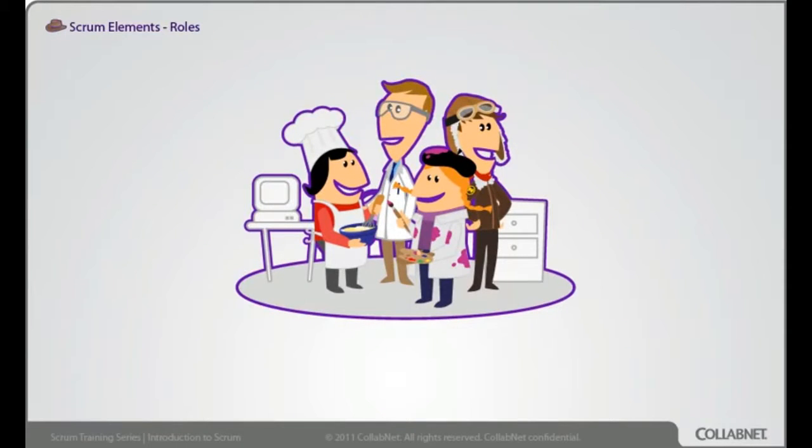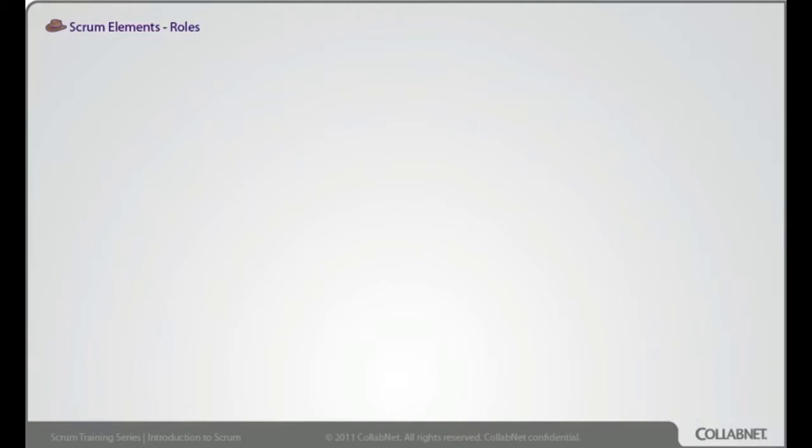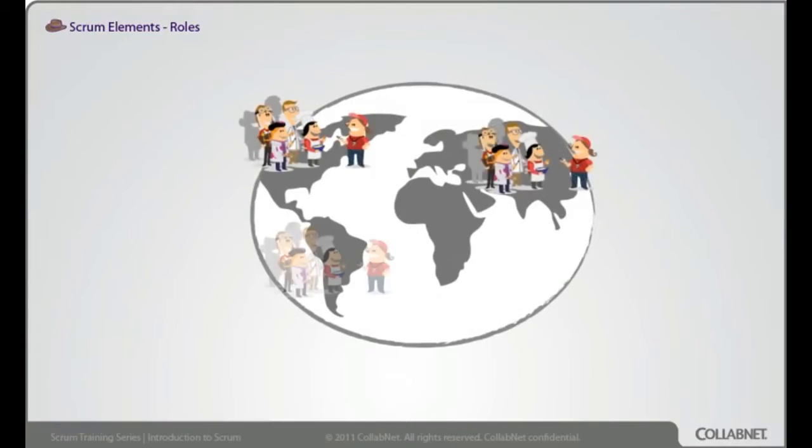Team collaboration emerges most naturally in a team room. If your organization is spread around the world, you're probably already suffering poor collaboration and coordination. Scrum will quickly bring this problem to the surface. You may experience breakthroughs by getting your remote people into one room for 1 or 2 sprints in the beginning, and then every few months after that. Information sharing tools help with the practical problem of sharing information, but tools by themselves don't transform organizations.